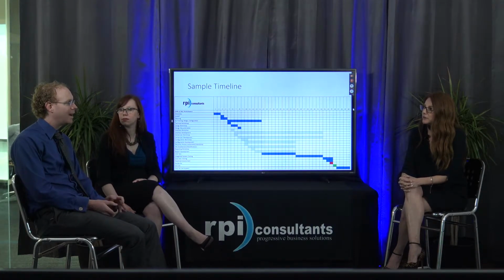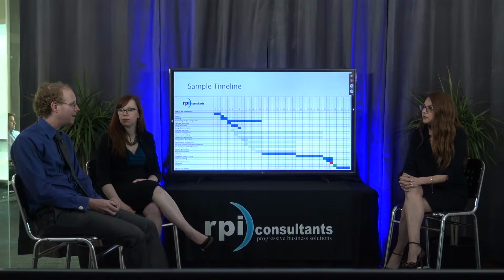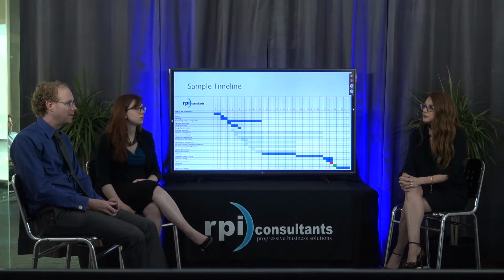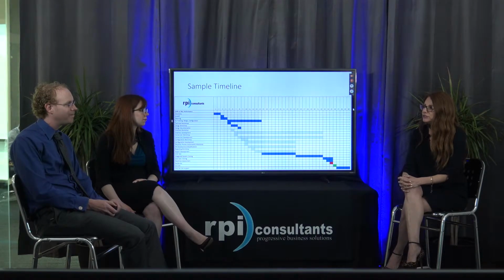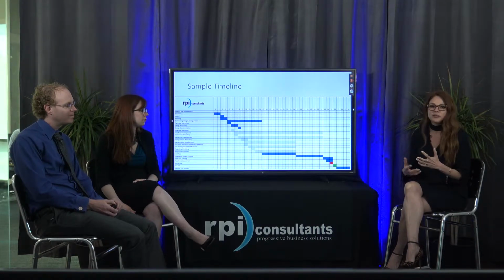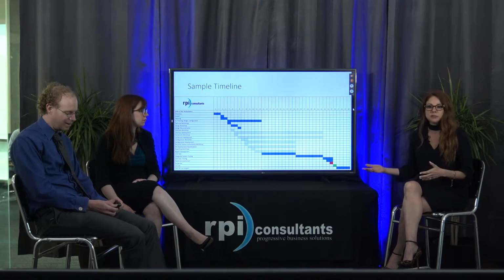You'd say that's about average for an organization that's doing, not a staggered rollout, but a full core GHR implementation? Yeah, 9 to 12 months. Again, complexities with the organization structure really play into whether it's going to be a 9-month or a 12-month, of course.